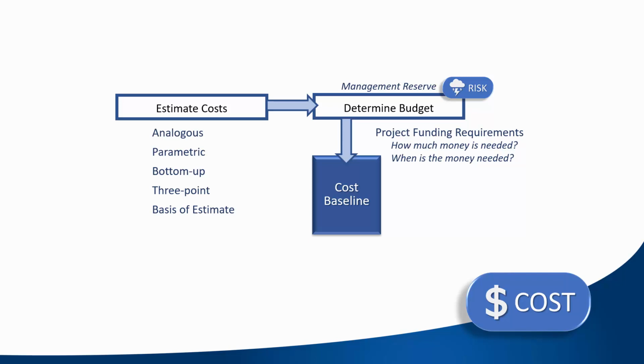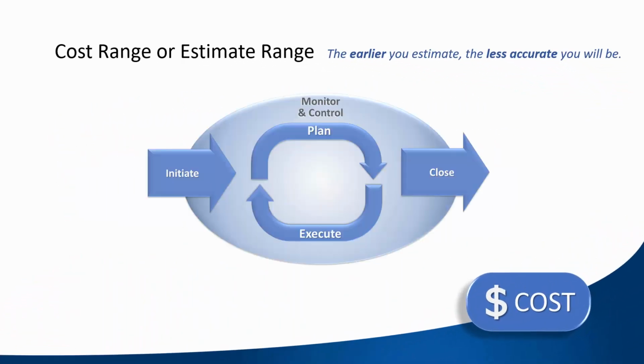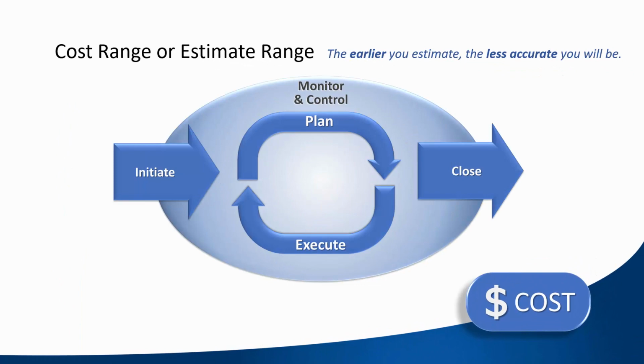Now, let's take a deeper dive on some new concepts. An important estimating principle is that the earlier you estimate, the less accurate you will be. Why? Because the earliest estimates are based on the least amount of facts. Before a business case can be constructed, estimates are made.